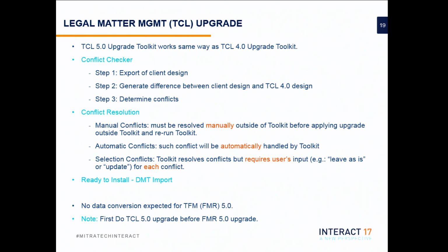For TeamConnect financial management, after going to 4.0, no data conversion is necessary as a part of the TeamConnect 5 upgrade. Just be aware that if you have both the legal management module and the financial management module, do the TeamConnect legal upgrade first and then the financial management upgrade, because there is some design dependency on TeamConnect legal that may cause a problem. So just for safety, do the legal upgrade first.